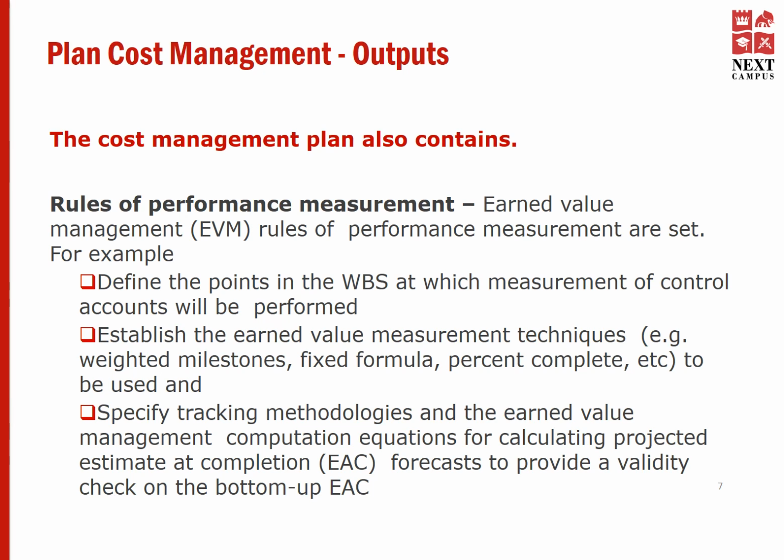Establish the earned value measurement techniques, for example, weighted milestones, fixed formula, percent complete, etc., to be used and specify tracking methodologies and the earned value management computation equations for calculating the projected estimate at completion. Forecast to provide a validity check on the bottom-up estimate at completion.